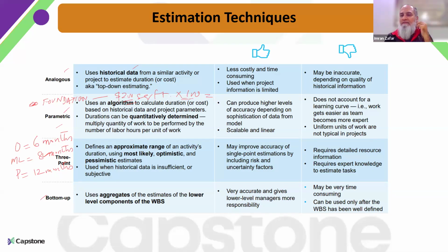Maybe your organization does not bother too much, you can have some margin to play. Let's say in a schedule you can go 10-15% plus minus. So then in that scenario, normally it happens, you do not need to bother too much about going into detail. You can utilize parametric or analogous, and that's fine.